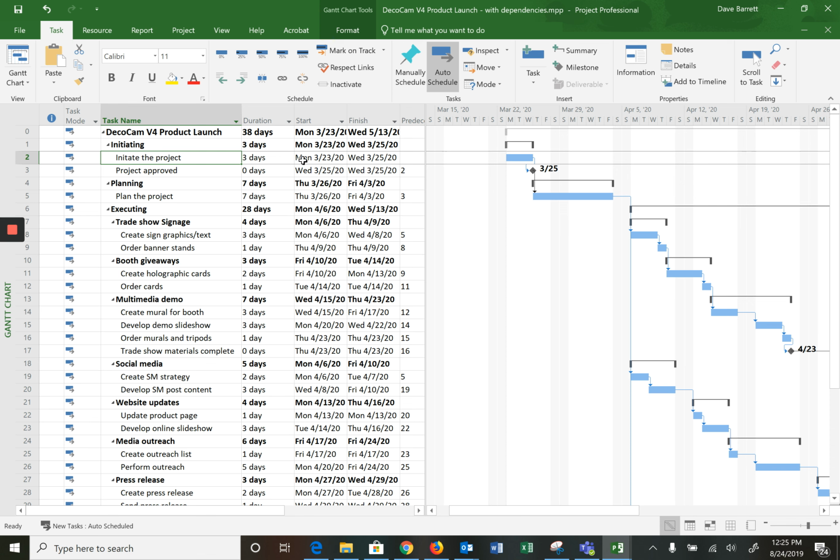So that's automatically calculated. Now, there is another type of activity, which we're going to call date constrained. These are activities that must occur on a certain date, have to. And they're scheduled to be on the date. And those are legitimate. For example, let's use the following example. We want to show that the project kickoff meeting is being scheduled, and so we're going to put that in between these two.